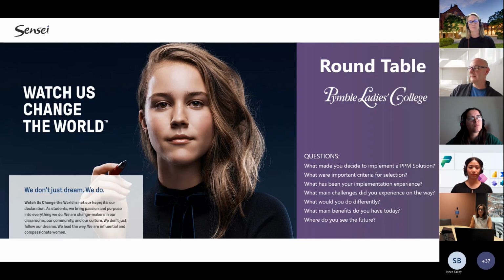Yeah, no, I hear you. And isn't it funny? At the end of the day, the reason why we implement initiatives, projects, programs, is ultimately to accomplish strategy. And key stakeholders, which are generally in the senior and executive management space, often just go along for the ride and expect that things we plan into the future will simply occur the way we've planned it. But as we know, the longer out you plan a project, the more uncertainty there is, which, as you mentioned, brings us to the KPIs. Just because it's red doesn't mean that you did a bad job. It just means that these are the warning signs, ensuring that we bring the project back on track, or at least manage expectations. Right?